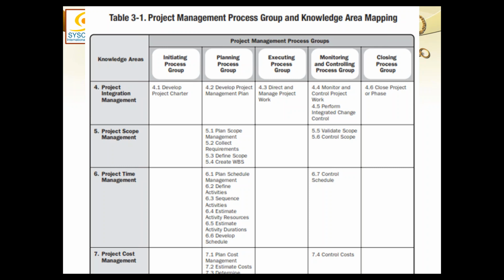Now you have filled that format. You have created that document. It is no more a template. It is a filled document. So you have populated the activity list, you have populated a milestone list, you have populated a network diagram. All these things you are doing subsequently result in further outputs, and ultimately you came up with a final output, which was the Gantt chart. That final output, if approved, will become the baseline.